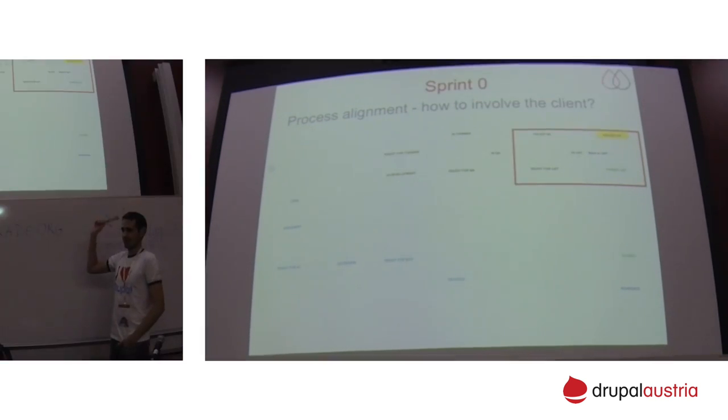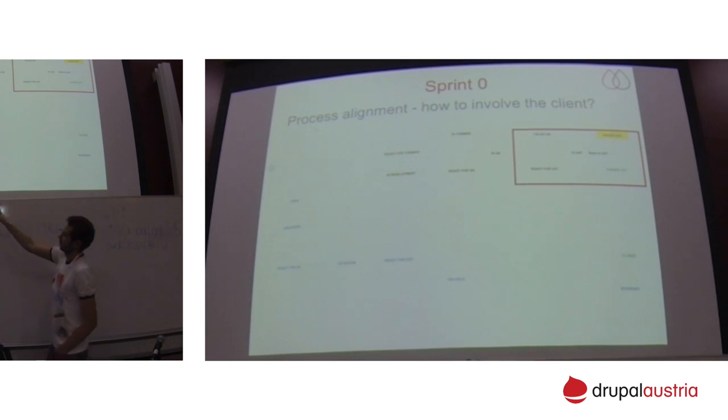Here is the flow of Jira for a user story for one of the projects that I worked on. So, the blue ones, actually, those are responsibilities of the client. So, those steps over there: a ticket is created, then it goes to the discovery. In the discovery, it's a high-level description of the ticket. You can imagine something like, as an administrator, I want to be able to assign different roles to users. This is the discovery, and this is the general description.